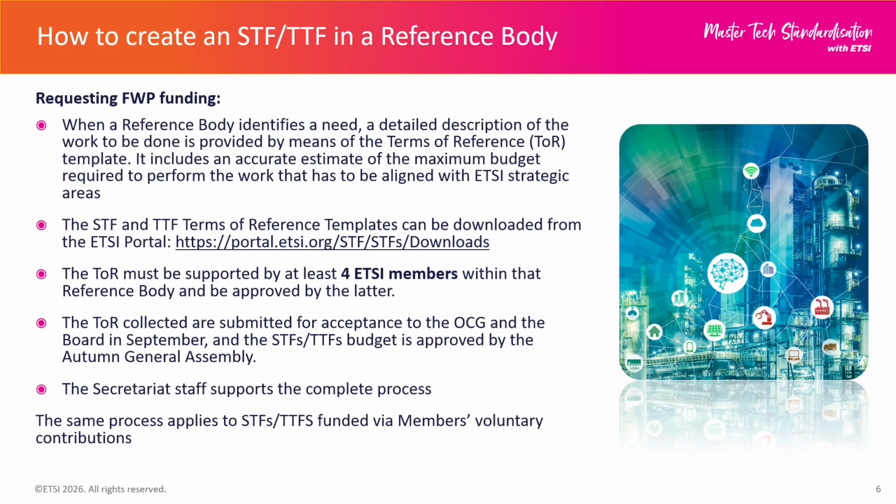To support this step, templates for both STF and TTF terms of reference are available on the ETSI portal. Once prepared, the terms of reference must be approved by the reference body and supported by at least 4 ETSI members within that body. They are then submitted for acceptance to the OCG and the board, typically in September, with the overall STF and TTF budget approved by the General Assembly in the autumn.